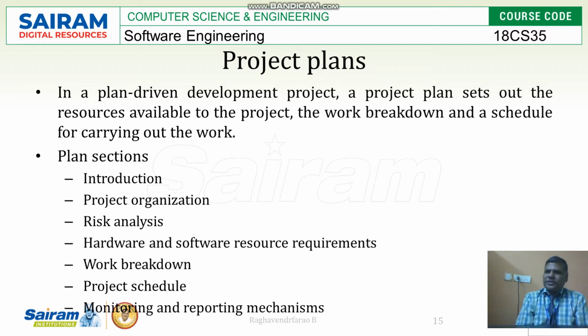So the plan sections, how it is going to execute. First will be the introduction of the project, then project organization, risk analysis, hardware and software requirements, work breakdown, project schedule, and monitoring and reporting mechanisms.